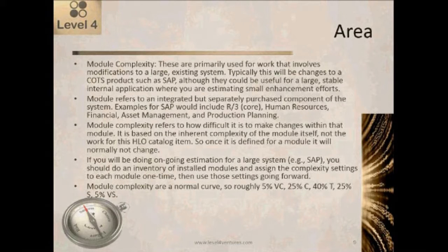And then we have the different modules from complexity very high to very low. These are primarily used for work that involves modification to a large existing system. Typically, what we're looking at is changes to a commercial off-the-shelf software product such as SAP, although they could be used for a large, stable internal application where you're estimating small enhancement efforts.